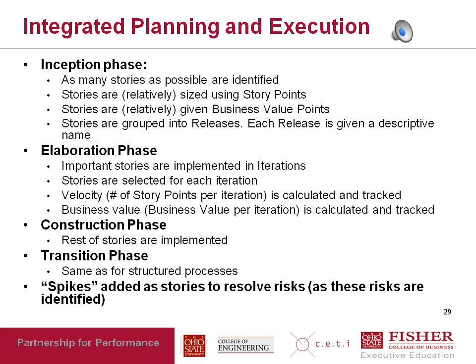So a technical spike would be added by a developer to go and investigate how accurate floating point calculation is in C++. Note that a tech spike is not a story that came from a customer, so it has no business value. A tech spike is a story added by a developer in order to resolve a risk.